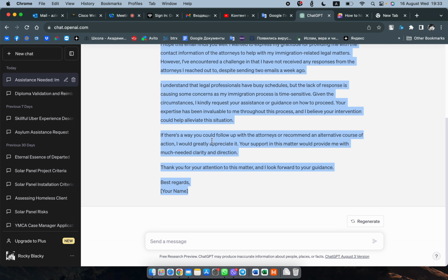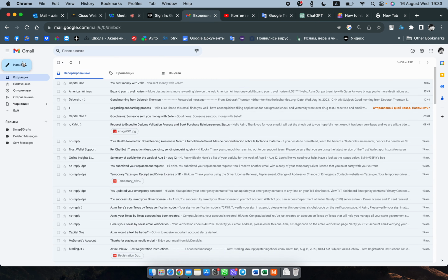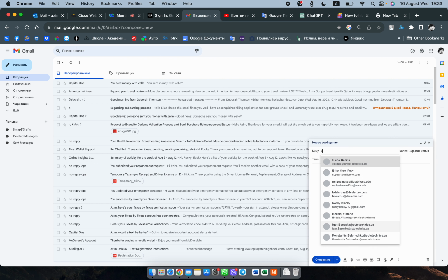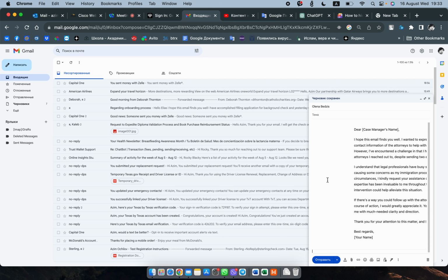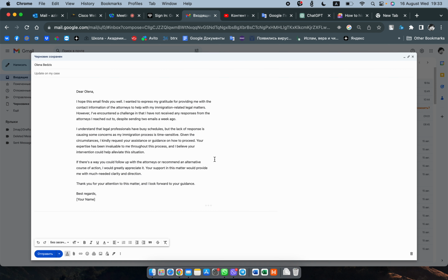And they may come up with some roadblocks. He's going to document those, and he's going to work with them, not in this 15 minutes. This 15 minutes is just to get the status and for him to update his project plan. He's going to bring this project plan and walk them through it. He's going to update that in front of them.